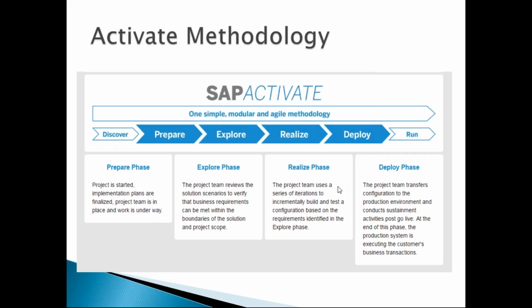Prepare is the first phase, where once the project has been decided, for example, if the customer has given the project to IBM, we conclude the scope of the project: what all modules we are implementing, to what extent of features we plan to deliver, what language packs we are going to deliver, and onboarding of consultants, allocating consultants to the project. All this will happen in the prepare phase, the first phase.